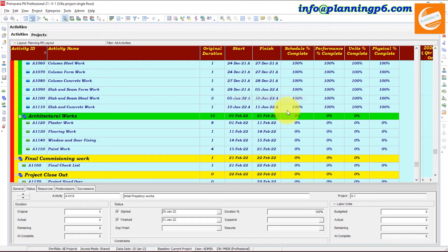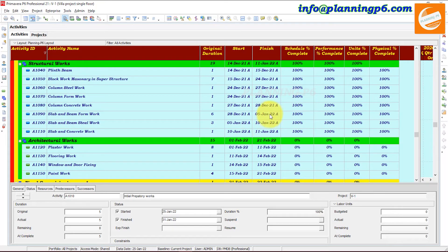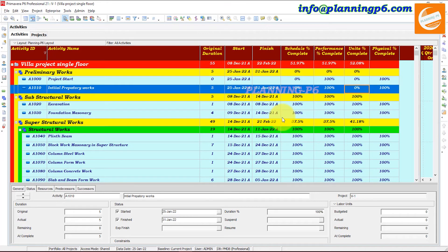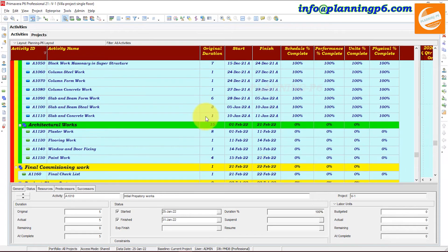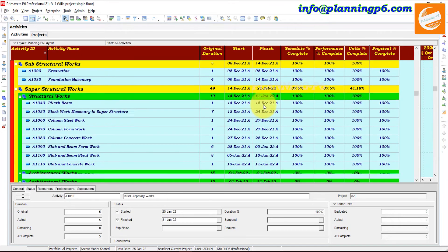You can see the actuals are applied up to 25th of January. After 11th of January, the next activities start on 1st of February. So behind all activities up to 25th of January are updated as planned. Now we will apply the actuals up to 5th of February.